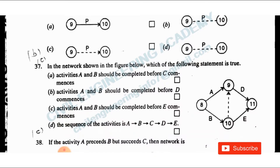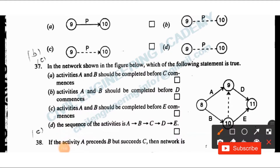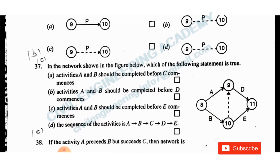Question 37: In the network shown, which statement is true? Option A: activity A and B should be completed before C commences — C is not present, so this is not the answer. Option B: activity A and B should be completed before D commences — using a dummy activity to link them. Option B should be the answer.